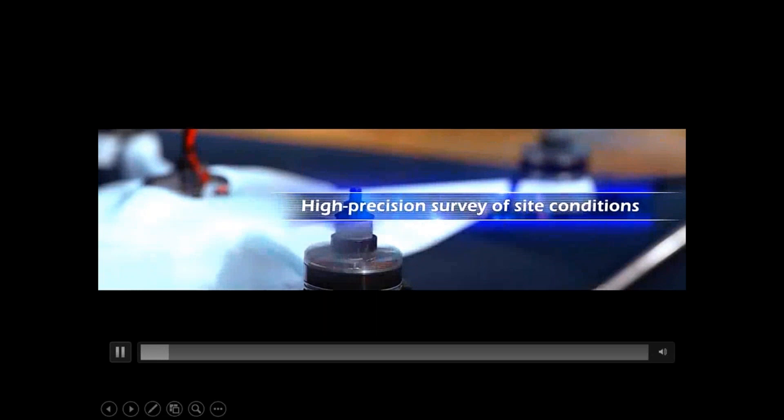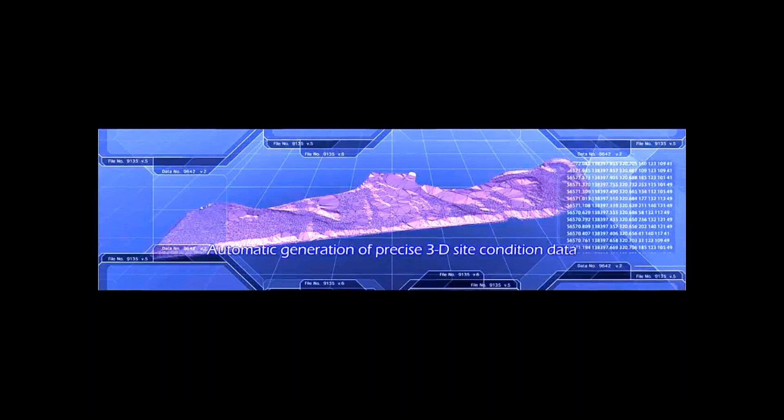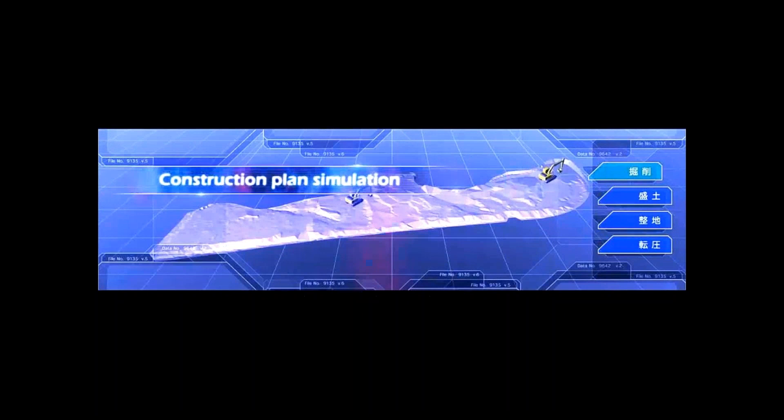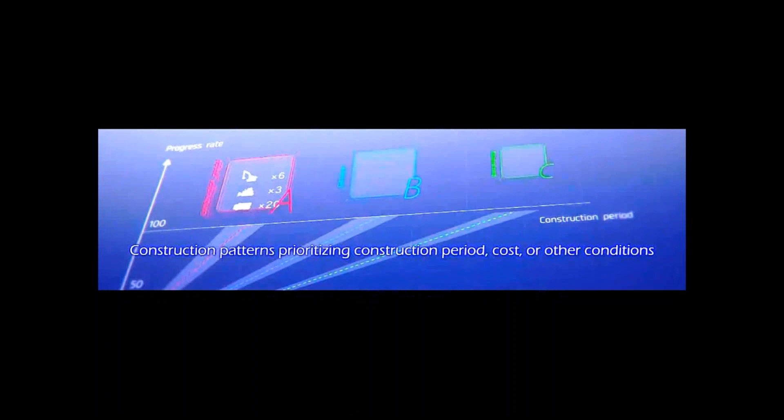This is an illustration of a collaboration between Komatsu, the Japanese plant provider, and Skycatch, a major UAV service and software provider. It illustrates the ability to fly over your site before construction begins, do a photogrammetry scan to get your 3D model, then take your 3D completion drawings of what you want, overlay those over the current scan, cut out what's left — giving you the volume of material you need to move. You can then do real front-end planning of what plant you'll need to move that exact volume and where you want to put it.